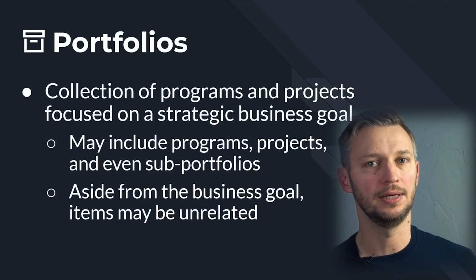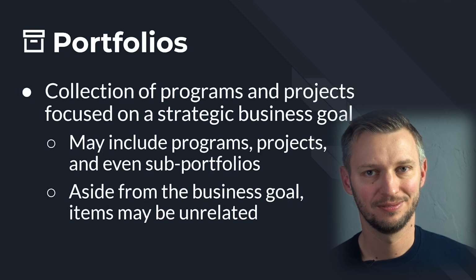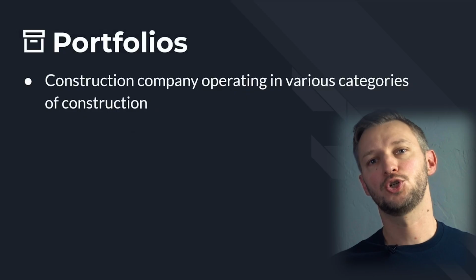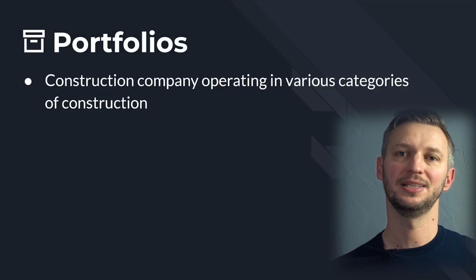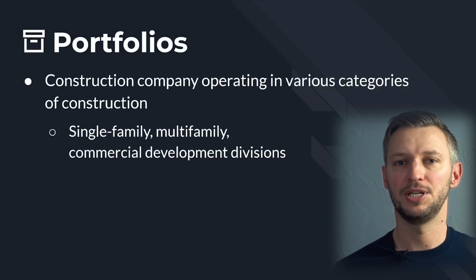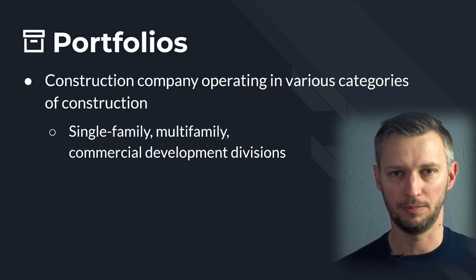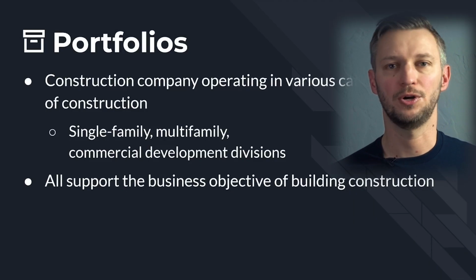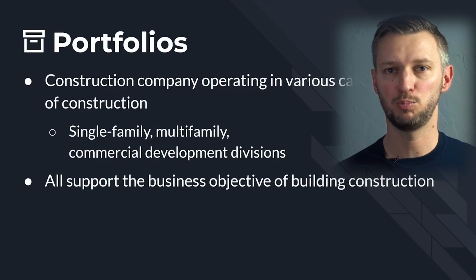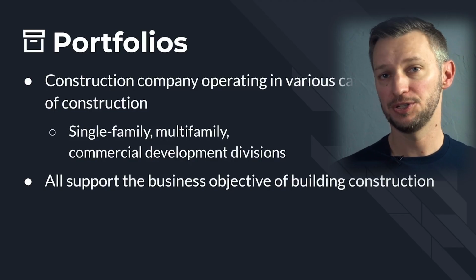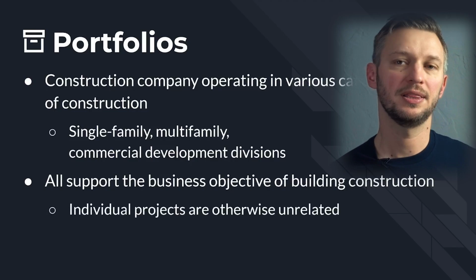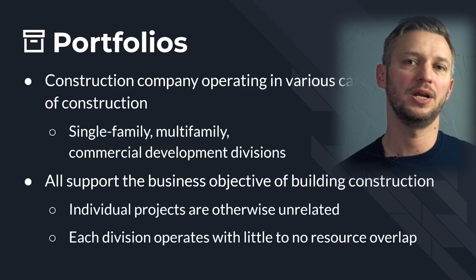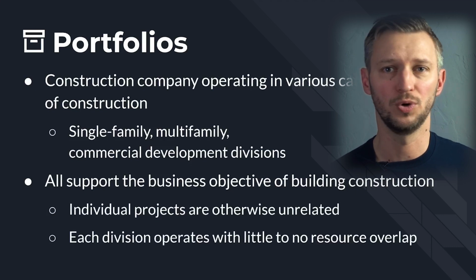Portfolios are managed by... Did you guess it? Portfolio manager. Wow. A good example of a portfolio would be a construction company that is operating at different levels of construction. That could be single-family dwellings, multi-family dwellings like apartments or condos, and then also commercial buildings. All the items, all the projects and programs within this portfolio focus on the strategic business goal of building construction, but the individual items within the portfolio aren't really related. Each division can operate with very little to actually no resource overlap.